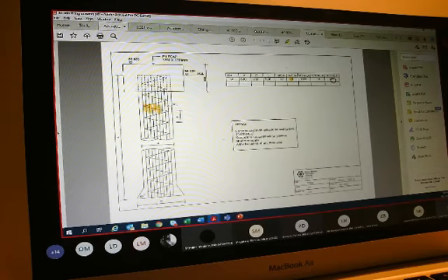So that you can find out what that would then mean down there. It tells us that we have 14 of these piles. It also tells us that the piles are 7 meter 800 long, and that the pile cap at the top is 1200 by 1200 by 600 millimeters deep.